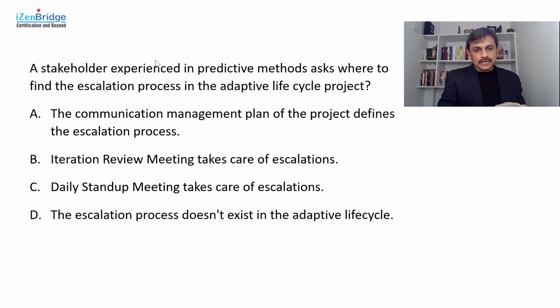So in a project context, things like the communication management plan, the stakeholder engagement plan, and the quality management plan remain valid even if you are working in the agile way of working. Now, it might be a very lightweight understanding. It might be just a one-page understanding, but there has to be an understanding of how we communicate, how we do things, how we escalate, how we do governance. So there has to be clarity on it.